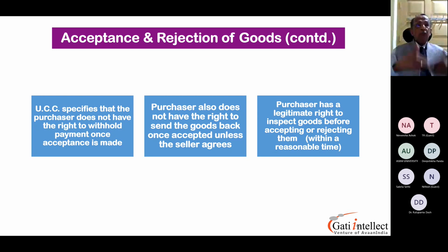So what you should do is, in the purchase order, you must explicitly say container loading, lashing and bracing is for the account of the supplier. If they come up with additional cost, accept it, because if you accept that, then the liability rests with the supplier. So be careful. These are precautionary measures one has to take. Is it clear? Yes, sir. Clear, sir.